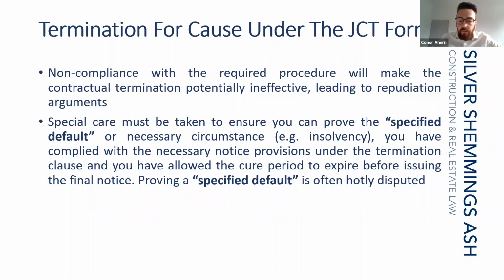Now, in that case, Vivergo were the employer and they had contracted the mechanical works to Red Hall. What happened was Vivergo wrote a notice to Red Hall and asked them to rectify various defaults. So they gave them a notice of default, and also to improve performance, because Red Hall, in Vivergo's view, hadn't been adequately resourcing the project. Before the 14-day cure period ended after Red Hall had received the default notice, Vivergo terminated.